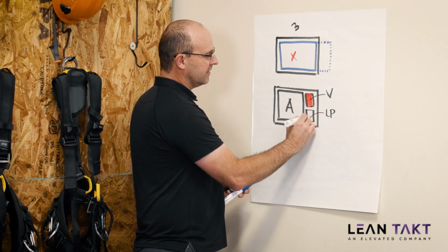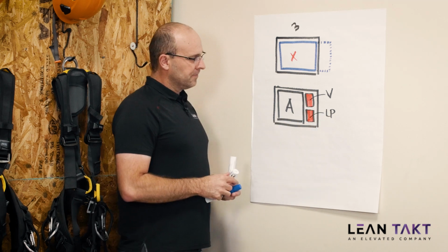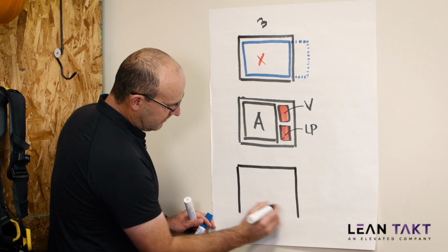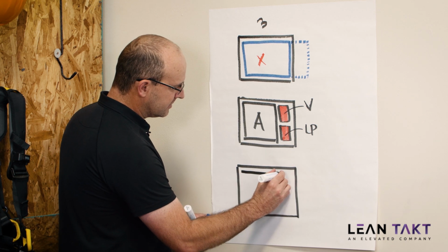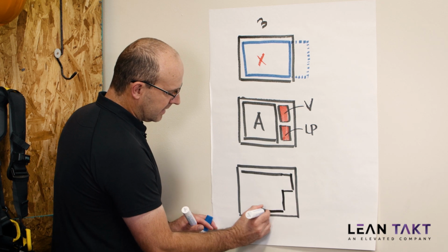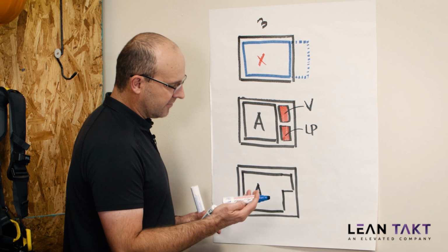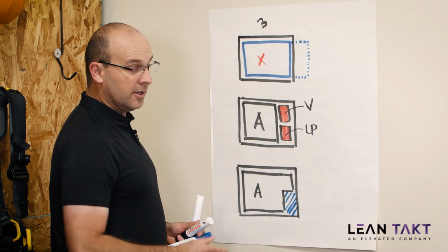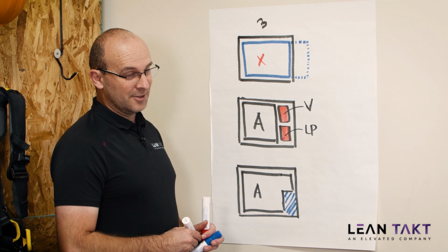Every crew experiences variation. Every crew experiences times when they have lower productivity. So from a leveling standpoint, what we want to see is an activity inside their takt time, or whatever their duration is, where the activity does take up a good portion of the time, but they do have a nice little buffer in here. Now, the buffer isn't, oh my gosh, we're going to sit around with lawn chairs and start drinking beer, although I wouldn't have a problem with that if you did it on my side, as long as you weren't on the property.